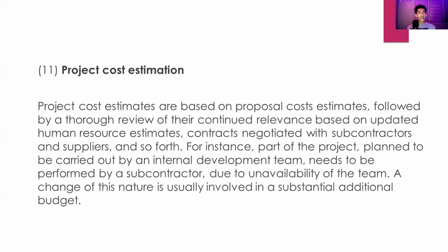The 11th and the last one, project cost and estimation. Project cost estimates are based on proposal cost estimates followed by a thorough review of their continued relevance based on updated human resource estimates, contracts negotiated with subcontractors and suppliers, and so forth.